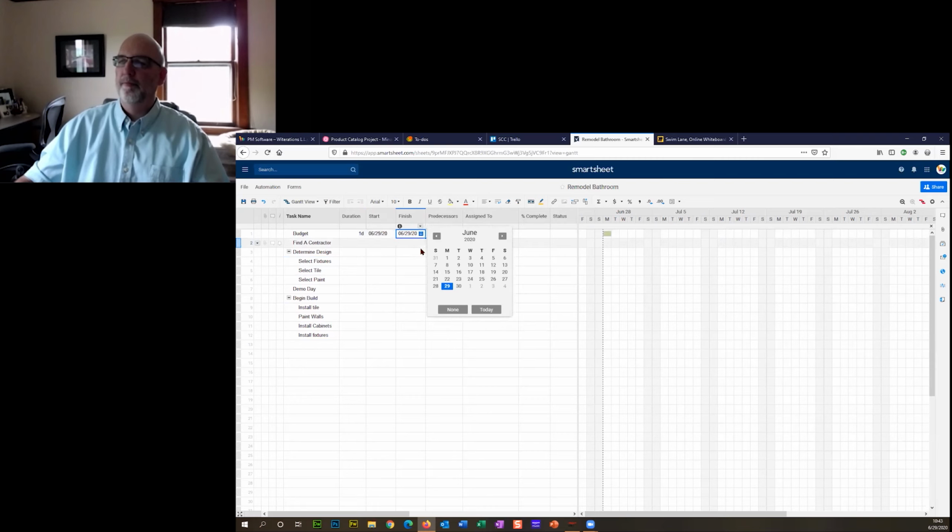So here on the budget, let's just pull this start date down and say we're going to start today. We're going to take a day to figure out the budget. So on June 30th, we're going to have the budget. Now you can see it's building out your Gantt chart. So this is a view of what this might look like. So I figured out my budget on, let's see, July 6th. I'm going to take the rest of the week off for the 4th of July. I'm going to start back up on the 6th, find a contractor. That's going to probably take me a week. Going to determine the design.